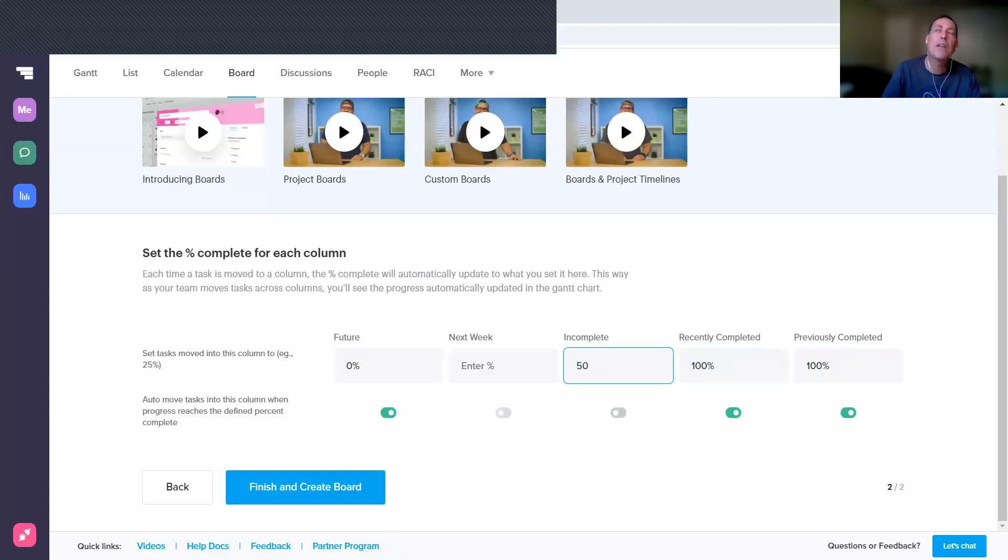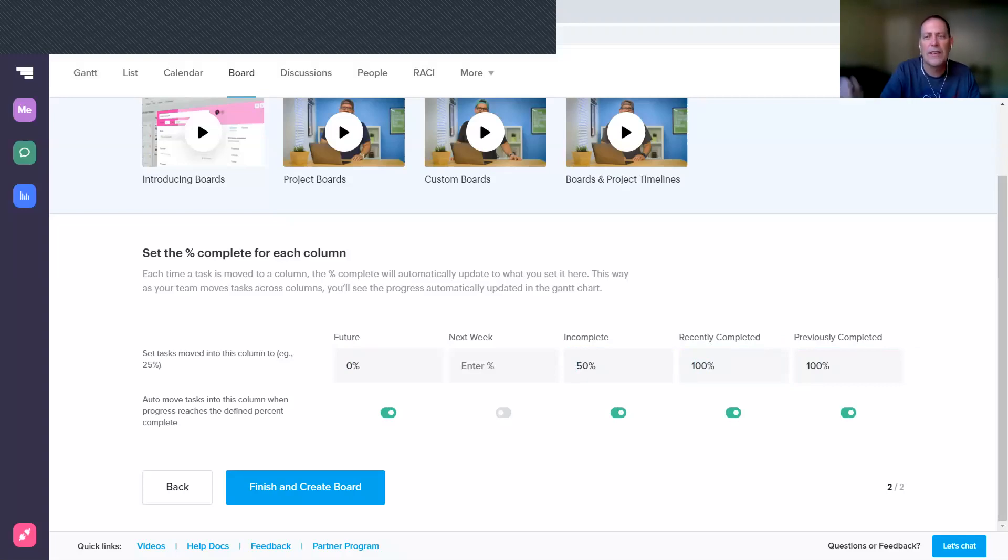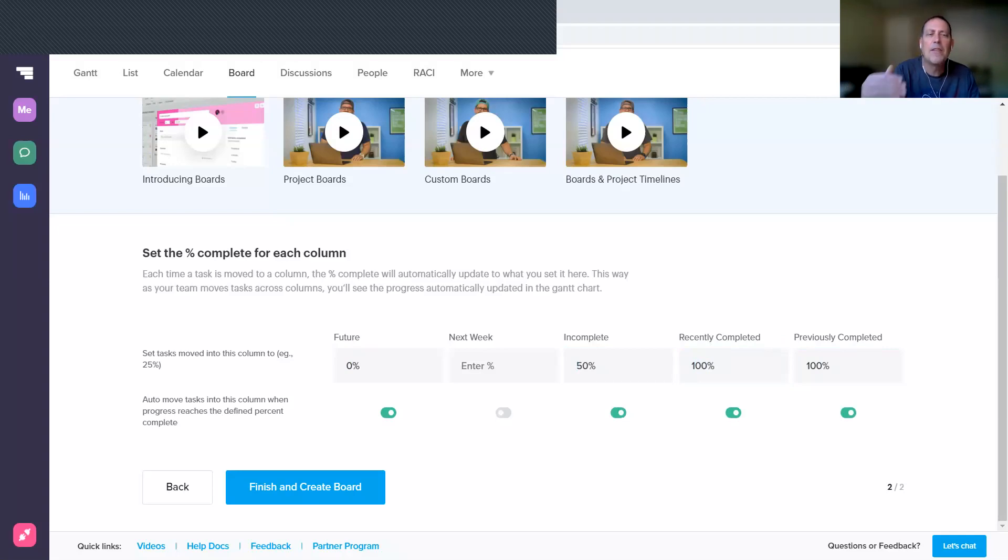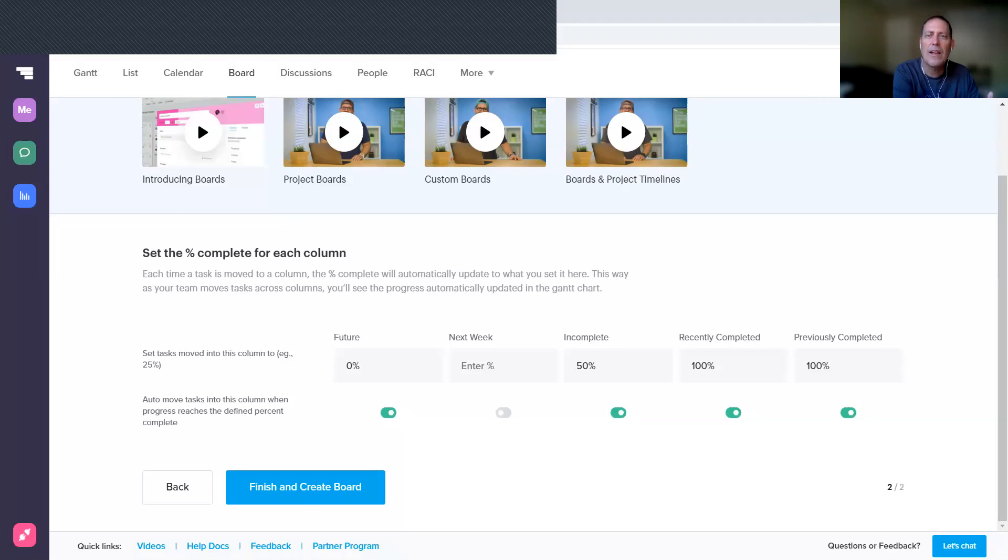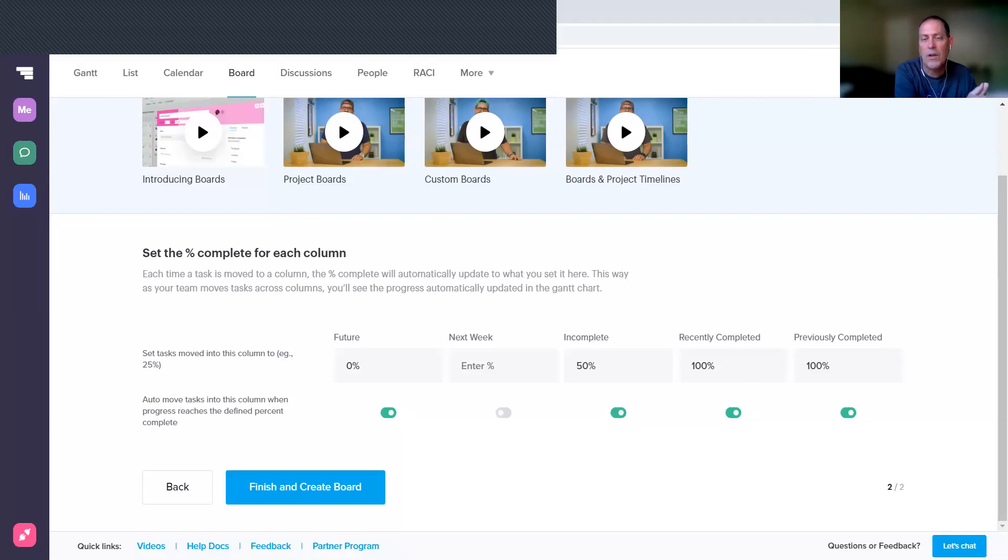So if you put something into Incomplete, it shows it's partially complete. Now you notice as I type these, we got these green bars at the bottom. If you look on the left here, it says that this is the auto move option. So if you set a task's percentage to a certain amount and it matches one of these columns, then TeamGantt will automatically move the task into that column, which is pretty nice.